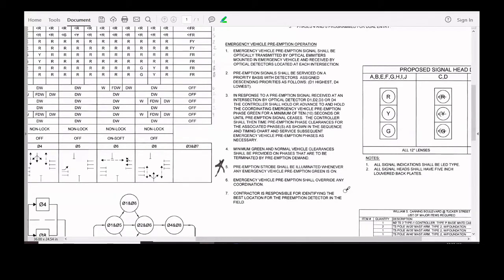Don't knowingly put something in a bad place that you don't think is going to work. If you're the one who's up there, I'm not, the consultant's not up there, as a supplier I'm not up there, you're the one in the bucket. If you can see where something's going to be in the way, and if I move it 3 feet to the right, it's going to be better, then try to get somebody's permission to do it, or at least note it, so when it comes out, you can explain and document why you put it in that place.